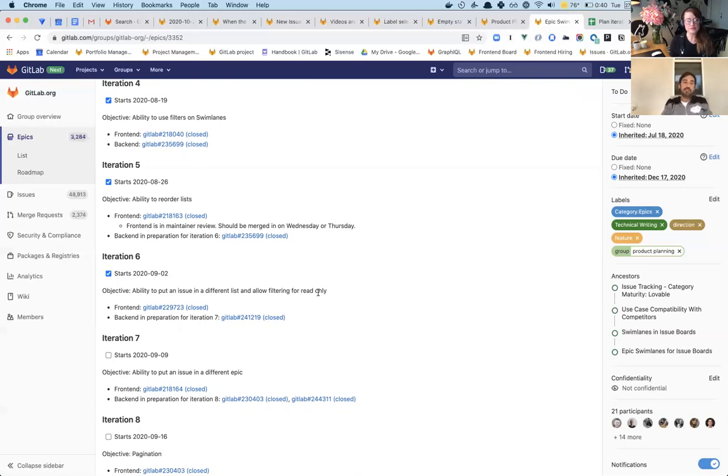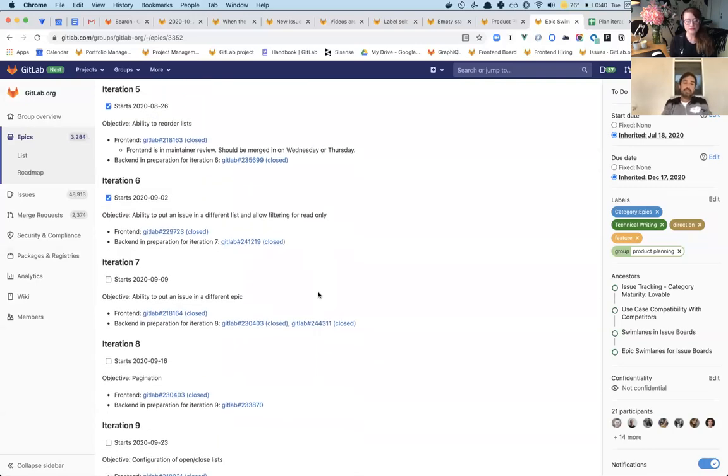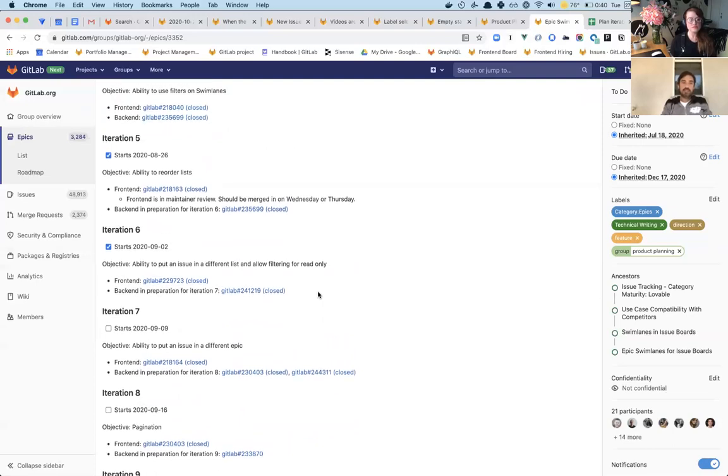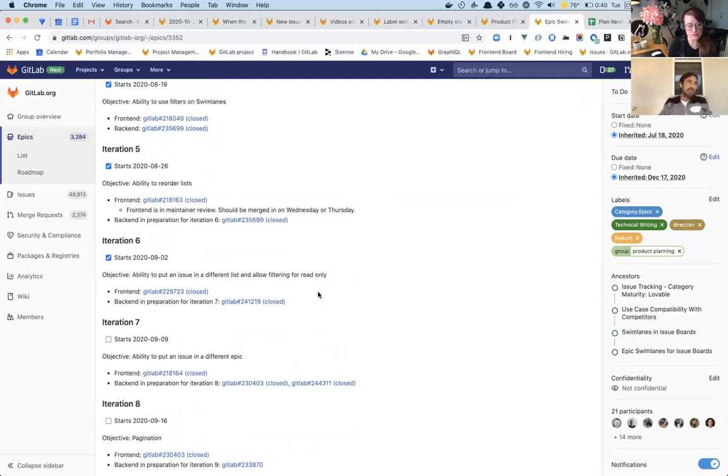So we were able to lay out the order that we were able to do things, and say that this is something that a lot of future things are going to be dependent on, so this is really something that we need to get done in an earlier iteration, as opposed to pushing it back to a future iteration. Okay, yeah, that makes sense.